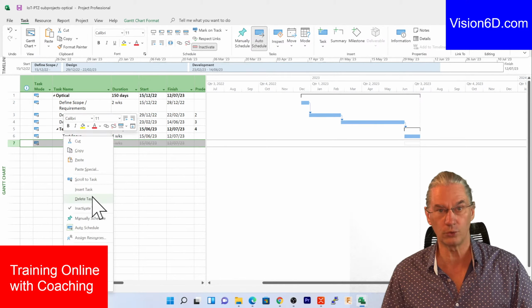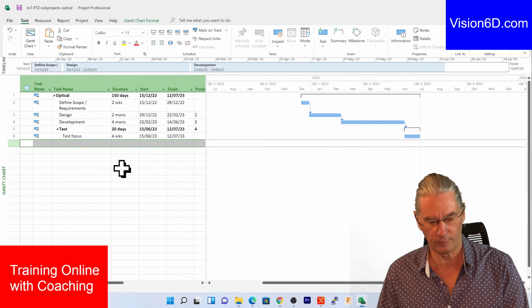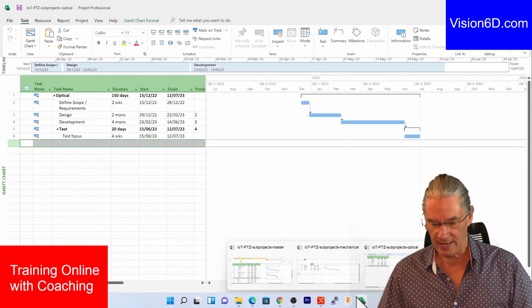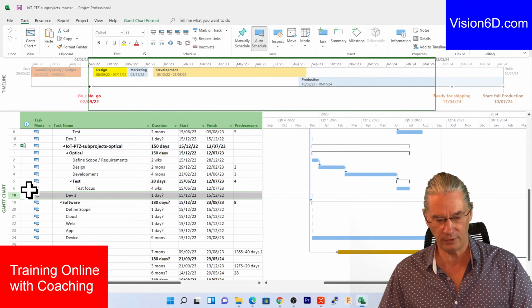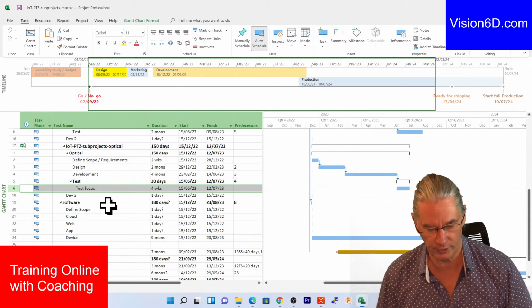So I'm going to delete the task. From the subproject, it is deleted now. And now I'm going back into the master project. And you see that we don't have the test on the material anymore.